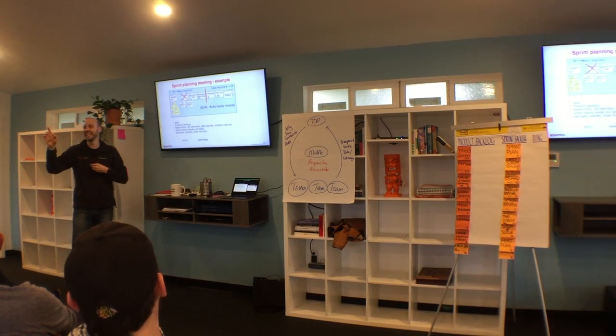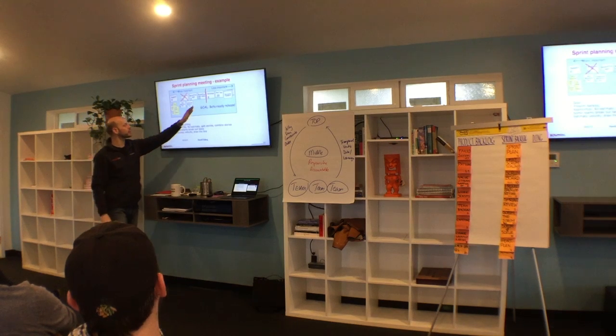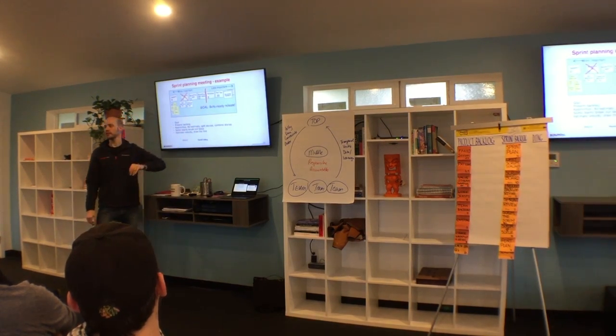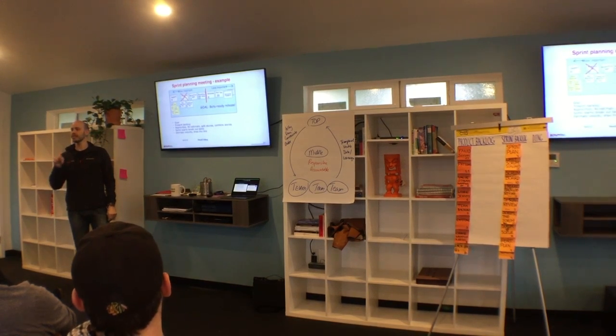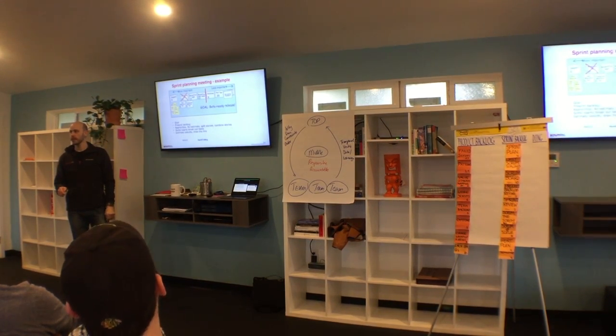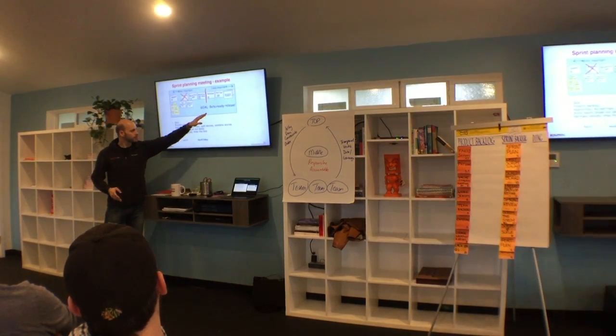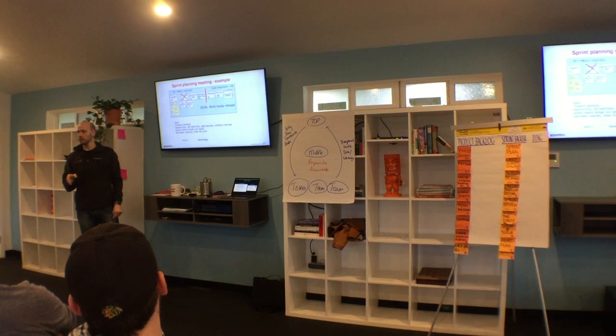But to your point, what if the product owner said, that's absolutely not a beta-ready release for us? We have to include at least one more item, which won't fit. In that case, they update the sprint goal, such that the sprint goal phrased for this sprint is achievable.